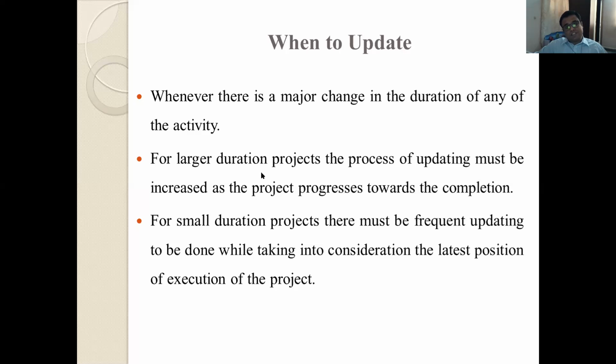For larger duration projects, the frequency of updating must be increased as the project progresses towards completion. For larger durations, there are many difficulties which will come across, so in that case we have to update frequently.